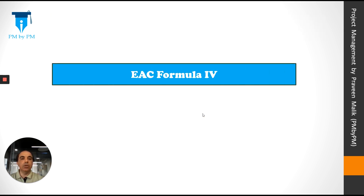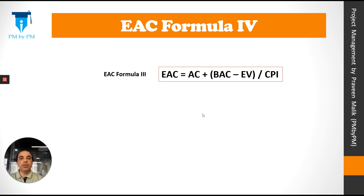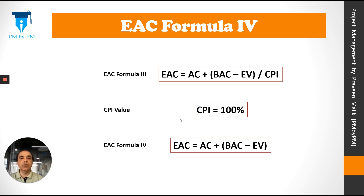Let's look at a fourth formula. Assume the project team believes that past performance will not affect future performance — the irregularities of the past will not be repeated. The remaining work will be completed at 100% cost efficiency as per the original estimates; essentially the 45 remaining tables will be built at $45,000 as originally estimated. Since CPI = 1 (100% efficiency), EAC Formula 4 becomes: EAC = AC + BAC − EV.